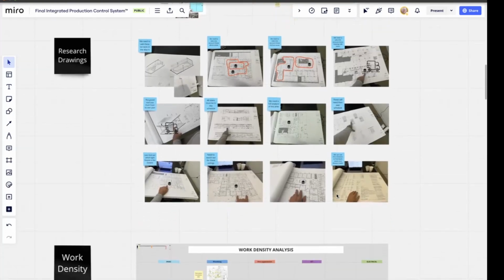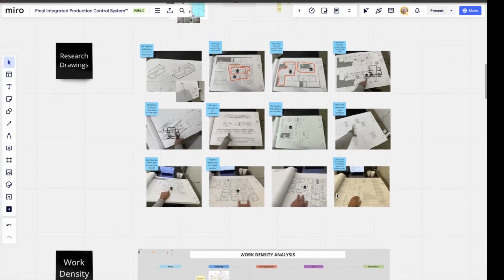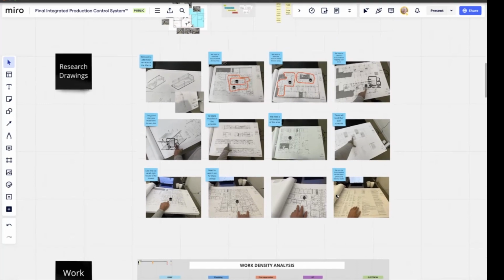The second major step, which I want all builders and lean engineers to know, especially at LeanTakt, is that we always research the drawings. We need to be doing, online or with physical plans, a page flip to identify things like stairwells, electrical rooms, dense areas in the project, or one-off areas that need special scheduling.